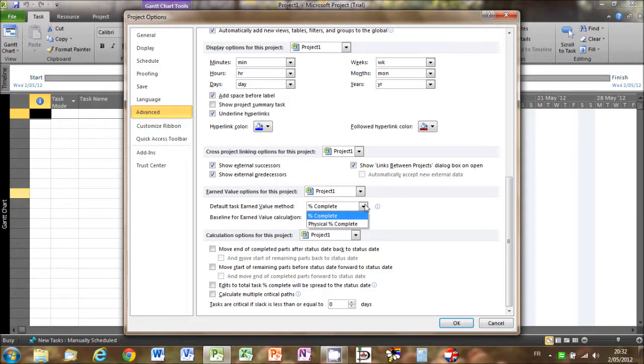That task would be physically 25% complete once 1,700 brochures had been printed. So the earned value would be 25% of the budget for the 6,800 copies, or 1,700 times the approved budget for a single copy. However, for the purposes of our pictures of a new home project, we want earned value to be calculated on the basis of percentage complete. So let's leave that as it is.